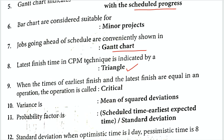When the earliest finish time and the latest finish time are equal, the float is zero, and that activity is called critical.